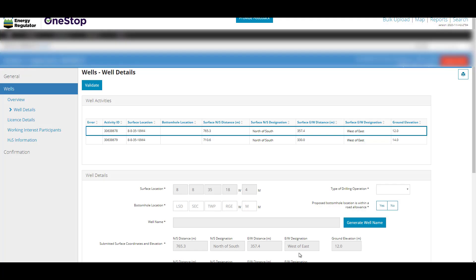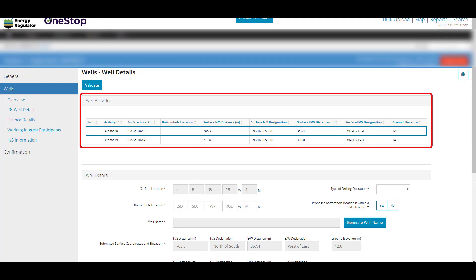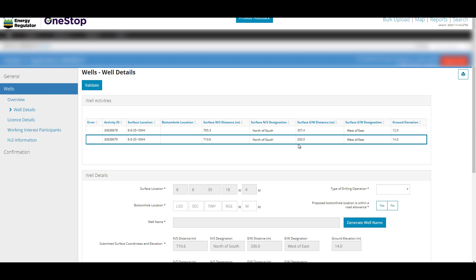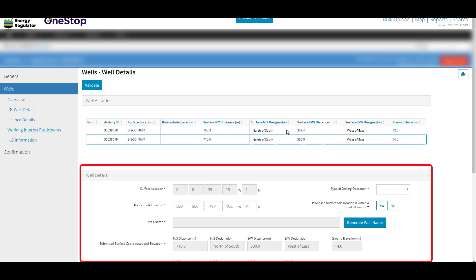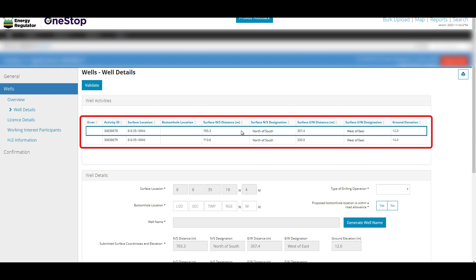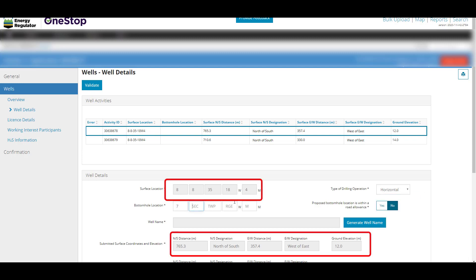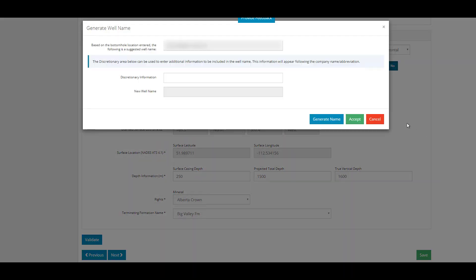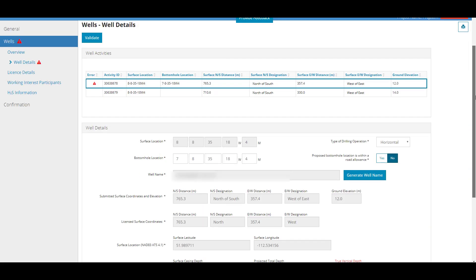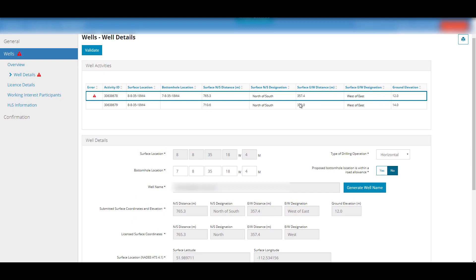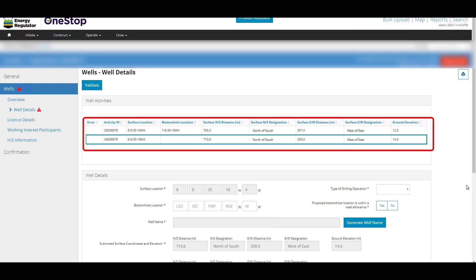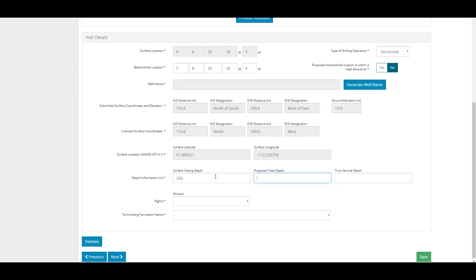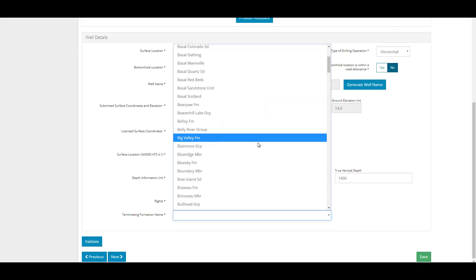On the Wells Wells Detail page, you will see multiple surface locations in the Wells Activities grid if this application is for a multi-well pad or oil sands exploration program. For a single well application, you will only see one surface location. If this is a multi-well application, the well details section will need to be filled out for every well. Grayed out fields cannot be changed, as they were generated from the shapefile. Click the Generate Well Name button to add a system generated name. Discretionary information can be added to the well name. To move to the next well in the grid, click on that row and it will be outlined in blue. Complete all fields for each well.